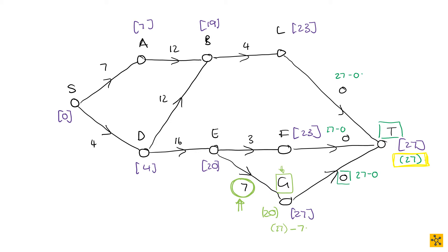Then you're going to look at F. So you're going to have 27 minus 3. 27 minus 3 is going to give you 24. So the latest start time for F is at time unit 24. And then you're going to do the same for L. L is going to be 27 minus 4. So 27 minus 4 gives you 23. The latest start time for L is at time unit 23.